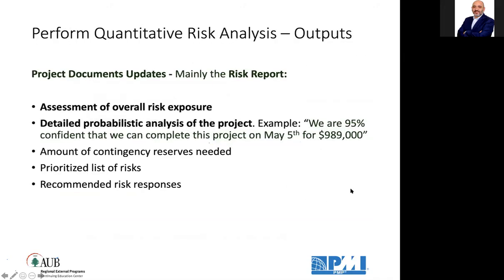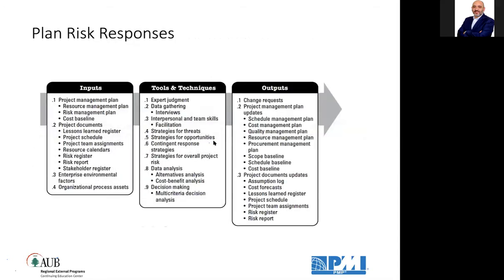So quantitative risk analysis should produce updates to the risk report: the assessment of the overall risk exposure, a detailed probabilistic analysis of the project, for example from the Monte Carlo technique, the amount of contingency reserves needed, and a prioritized list of risks. After qualitative and quantitative analysis, we recommend risk responses.